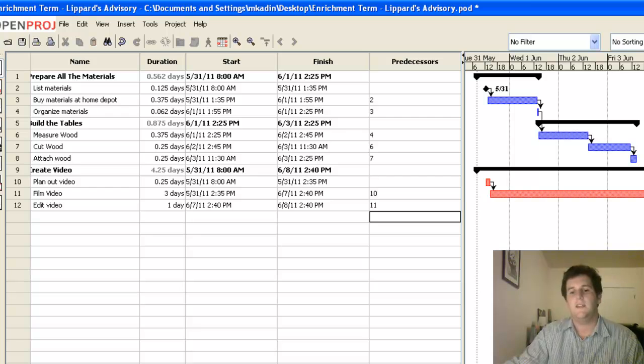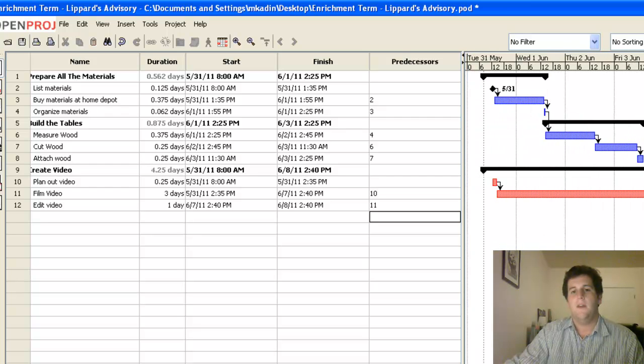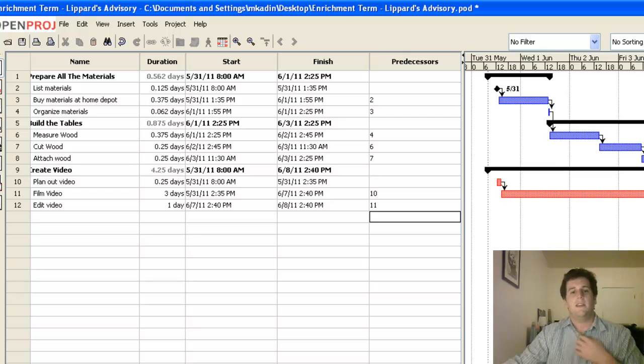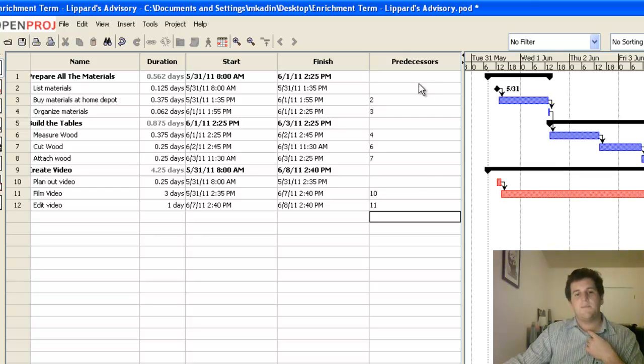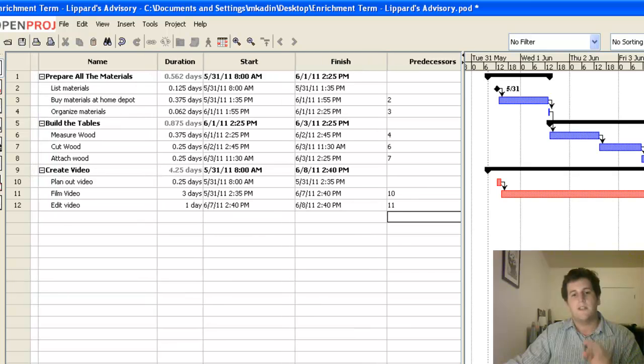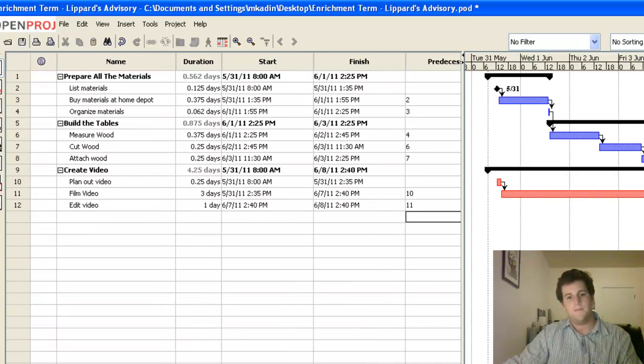So you can start to see how this Gantt chart is going to fill itself out. And some things can happen at the same time and other things can't. That's predecessors. And it's important that you do it at the very end. Get all your information in there first, then start assigning the predecessors. Otherwise, it's going to get too confusing.